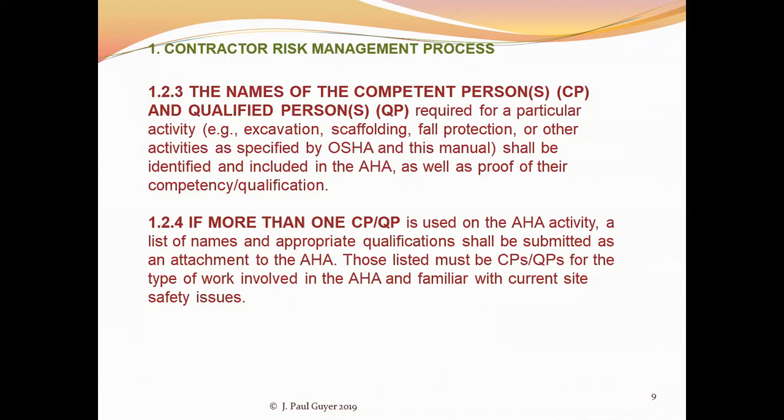And then there is a space for who is a competent person that knows what they're doing as far as this particular step is concerned. So this gives the worker a tool, and again, emphasizing that this form needs to be in the hands of all of the workers on the job site who are involved in a certain task, so that they see we're now moving to this step in the task, and what are the hazards, and what are the controls, the protective equipment that I need to have, and then who knows what they're doing on this particular task, either a competent person or a qualified person.